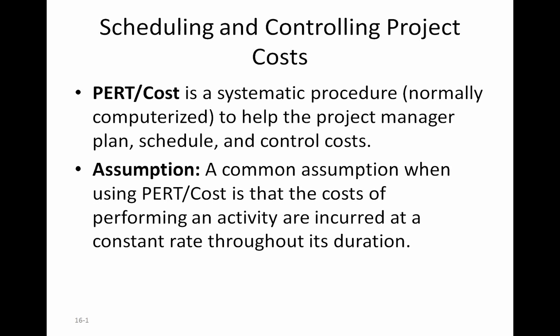The project is going to finish in the same period whether you start early or late, so that duration is not going to change. But by scheduling the activity late, you can save on the interest payment.